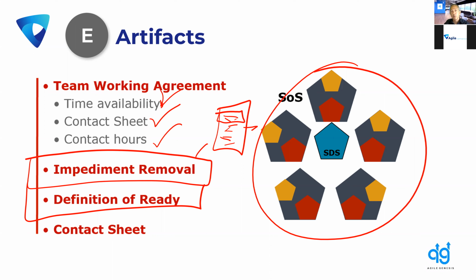But if you are a product owner, I've got some encouragement for you to spend more time than you did before refining the product backlog. It is that much more critical that we have a ready product backlog. If you don't, your entire team is going to sit idle. They can't come to you with a request every time they want to work on something. That's going to move the needle very, very slowly, if it moves it at all. It is on you, product owners, to have a product backlog that contains enough ready product backlog items for the team to remain productive sprint after sprint.